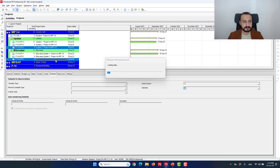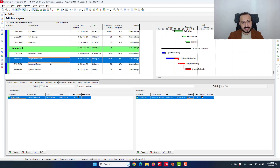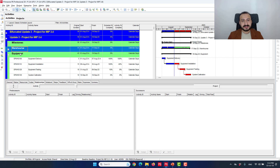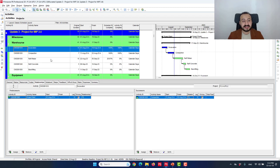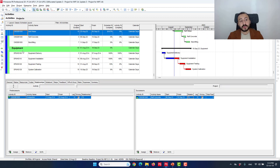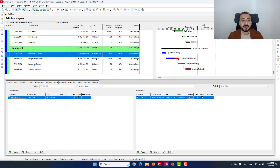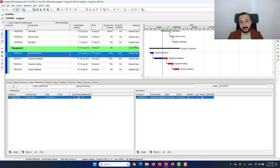Let's open update number three, for example. It is exactly the same — no changes. And the critical path changed as well, from the warehouse to equipment. So the critical path shifted and the contractor did not make any changes. Why? Because it's a question mark — why would the contractor make changes to the warehouse to mitigate the delay and not for equipment? Maybe they wanted to manipulate things, disqualify the warehouse activities as a critical path, and allow the equipment to overtake the critical path — perhaps because that delay is the responsibility of the employer, so they can have an extension of time claim.